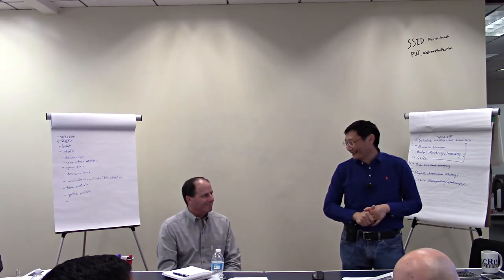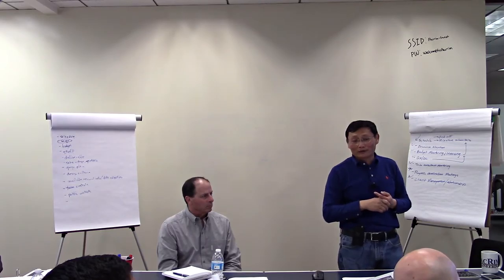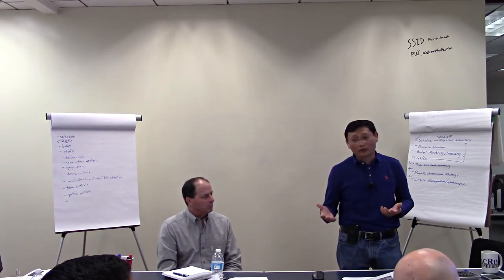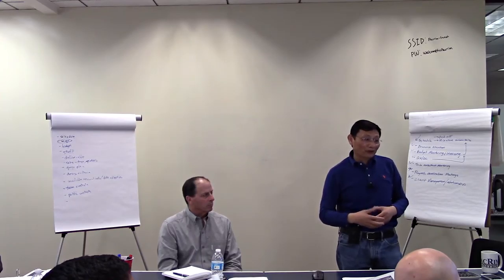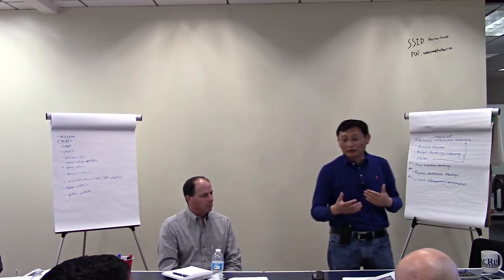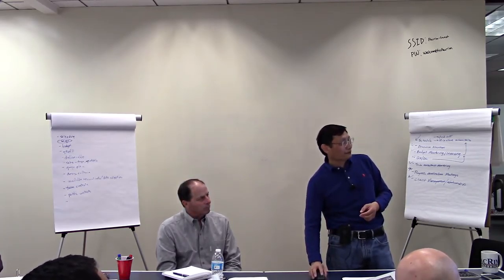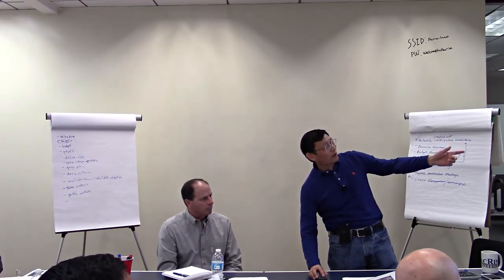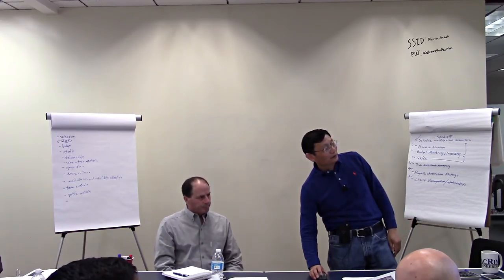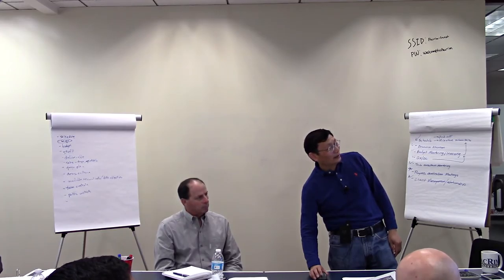Another piece we want to make sure of is to allocate enough time for the review. If you work with Caltrans and you say, "Hey, I give you 2 weeks to review," people know you're not being realistic, right? You want to really know what the agency wants for the review. Caltrans wants 6 weeks. You have to give them 6 weeks for the first submittal. There's no way to shorten that. For Port of Long Beach, you have to talk to them, see what sort of commitment they are willing to give you, then you assign that, so you have some dialogue beforehand.